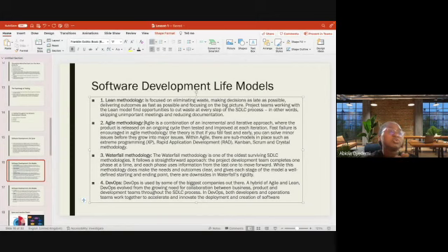So you decide that each component will be executed within 2 weeks, at least to the completion of the project. So you give 2 weeks, maybe the first 1 week for development and the next 1 week for testing and fixing of errors. All right. So within these 2 weeks, we are saying that we want to develop the whole of component A. That is what sprint is in software development. All right. So you plan a sprint and then you assign 2 weeks to it.